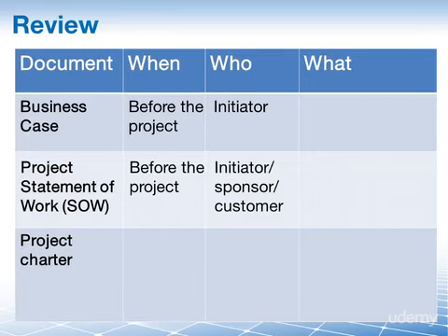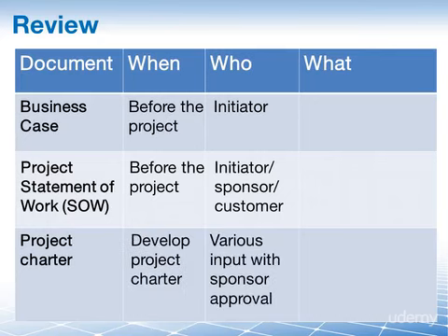The project charter, however, is created in the develop project charter process. Purely theoretically, it should be created by the stakeholder, the project initiator or project sponsor, but more often than not, this document is developed by the project manager for the stakeholders. Then the project sponsor will sign the project charter, which gives us the authority to manage the project.